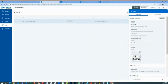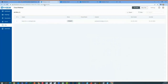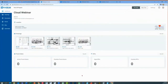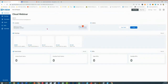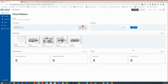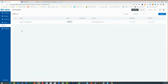I'll hit send on this RFI. With RFIs, it's different than a punch list — when I respond back to an RFI, it automatically closes it. That's really nice because the loop is just question, RFI, respond, and it's automatically closed. Going to my dashboard as Jack, there's nothing overdue — no RFIs nor punch list items. I can click 'view all' and see that this RFI has automatically been closed.